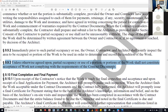Section 9.9.3: unless otherwise agreed upon, partial occupancy or use of a portion of the work shall not constitute acceptance of work not compliant with the requirements of the contract documents. Just because you're using it and living in it doesn't mean it is right. Sometimes you move in because you're tired of living out of a garage — but that doesn't mean the work complies. Acceptance of the space doesn't mean it complies. They still have to correct it.